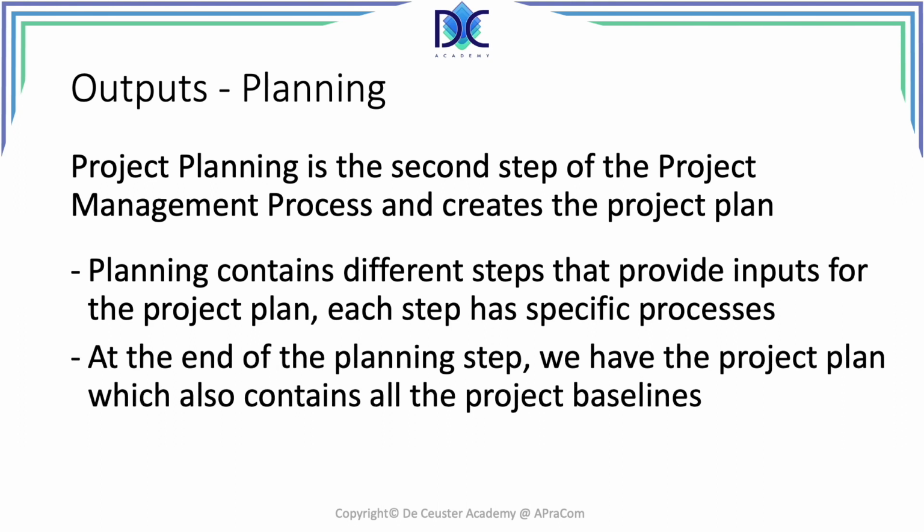At the end of the planning step, we have what we call the project plan. And the project plan contains all the baselines. And the baselines are important because they are the plan that we want to complete, that we want to implement, and they provide us the necessary information to execute the project.